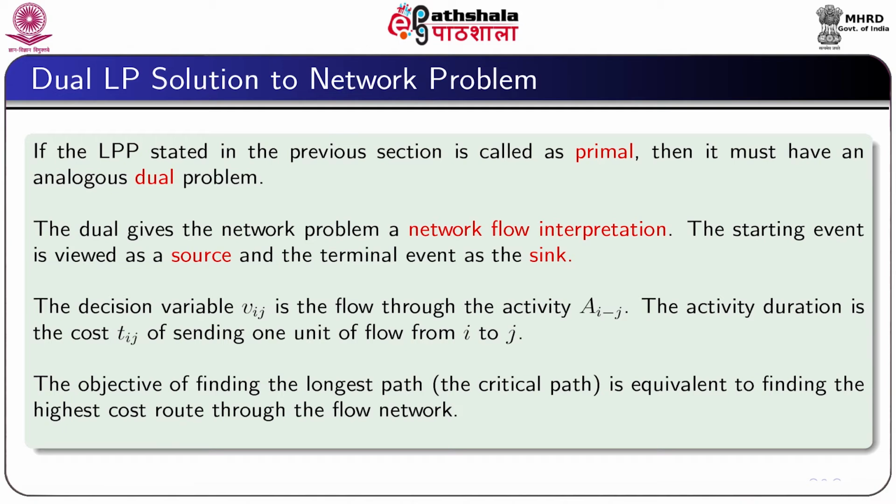By these definitions, the problem is to find the longest path, that is the critical path, which is equivalent to finding the highest cost route through the flow network.